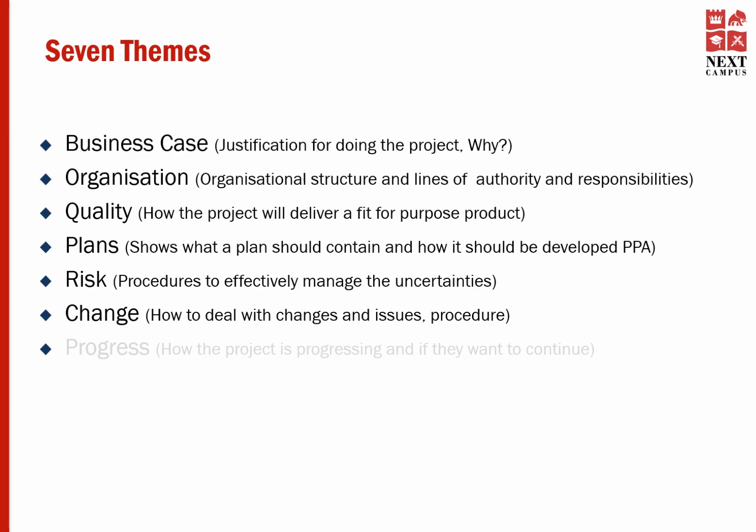The change theme also covers configuration management. Each project requires a configuration management system which tracks products, issues, and changes. The configuration management strategy document describes how issues and changes will be handled in the project.